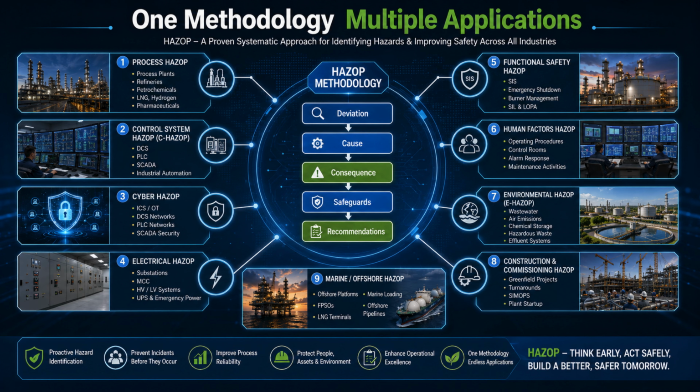Although these HAZOP studies focus on different engineering disciplines, they all follow the same structured methodology. Every study identifies deviations, determines causes, evaluates consequences, reviews safeguards, and recommends actions to improve safety and operability. The methodology remains the same, only the application changes.